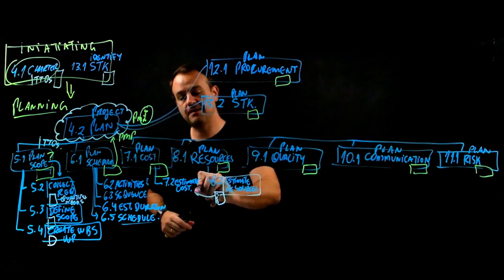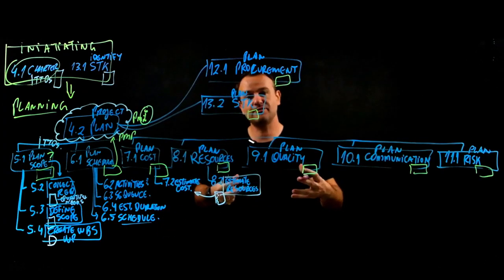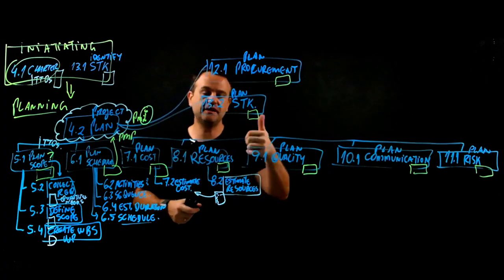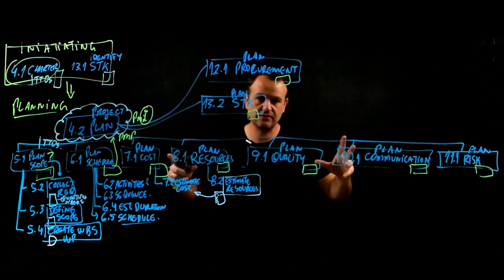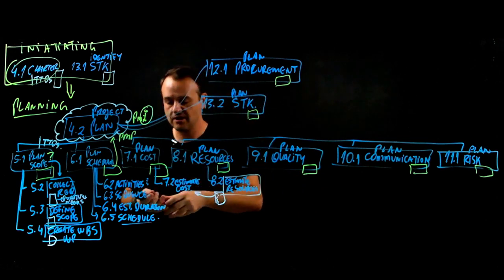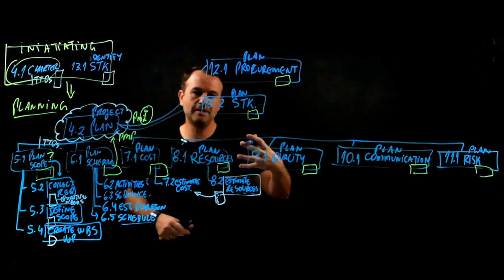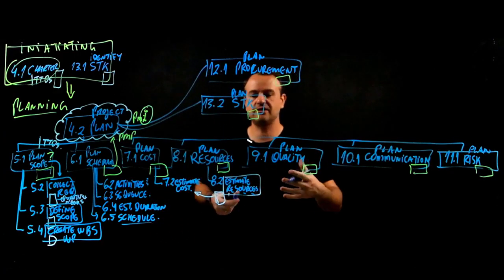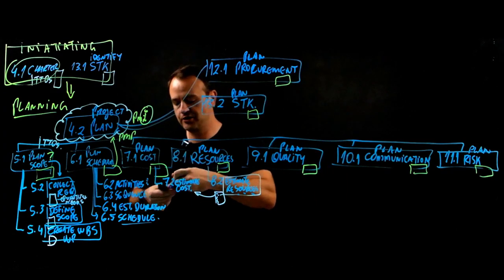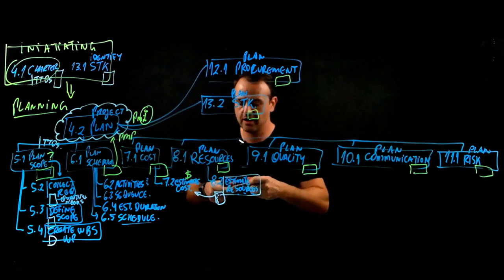And based on the resource list, which might be a very long resource list, maybe we have 1,000 resources, 10,000 resources, then somebody in the organization would go through the estimate costs, and in the estimate costs they would be able to put monetary value. Sometimes you need quotation, you need information from different resources in your specific activity so that you understand what are the monetary values. So here, just the resources I need and how much I need them, quantity of resources, number of units or people that I need.